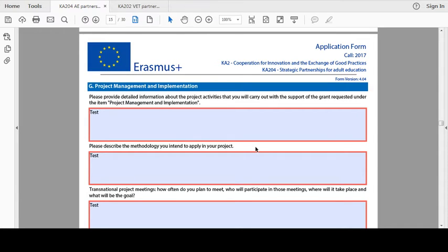The best quality projects will use qualitative and quantitative indicators of achievement in order to assess whether and to what extent the project has achieved its objectives and results, which help to demonstrate the impact of your project. If you have these in place, please give details in this section. List the indicators and attach numerical targets to quantitative indicators wherever possible.